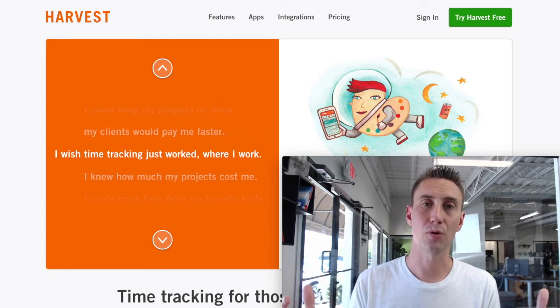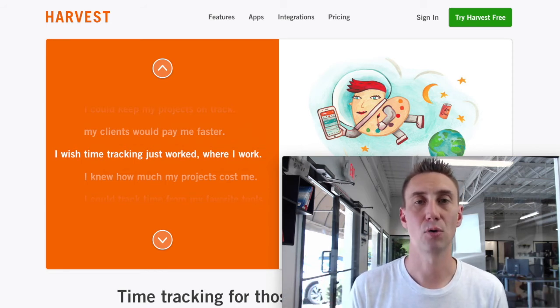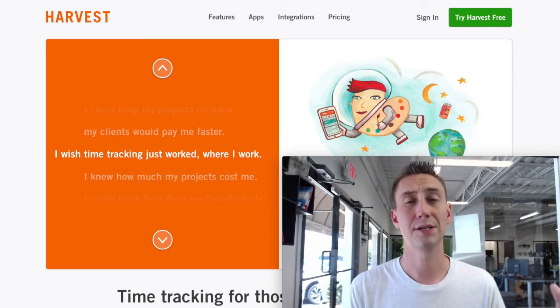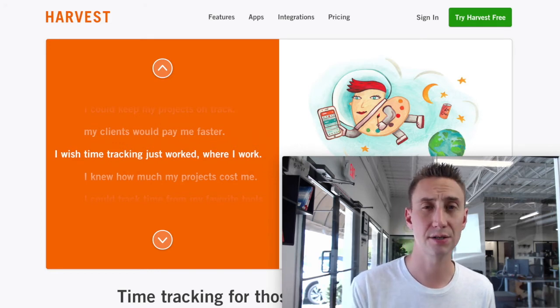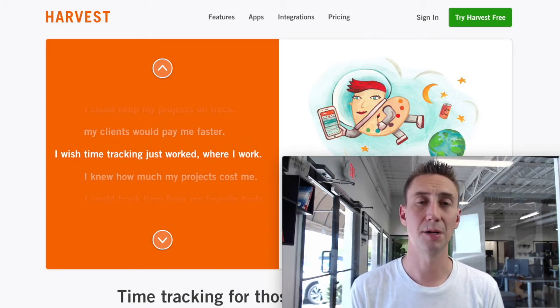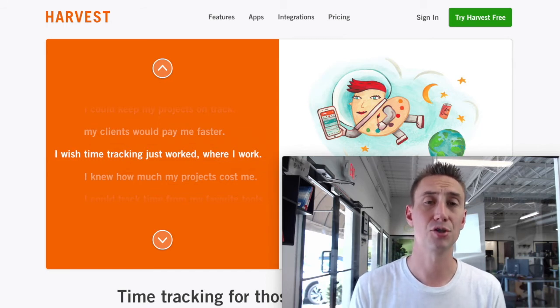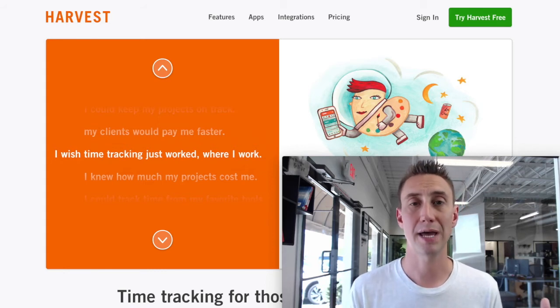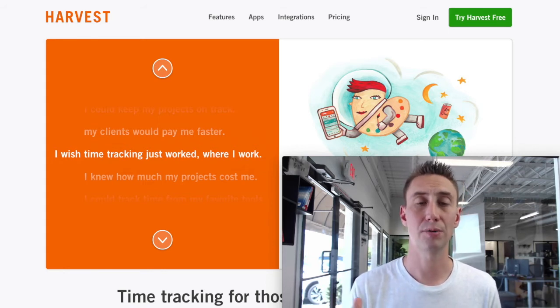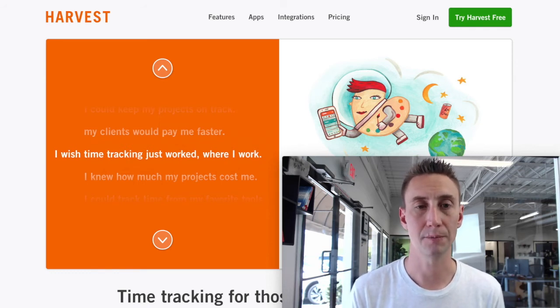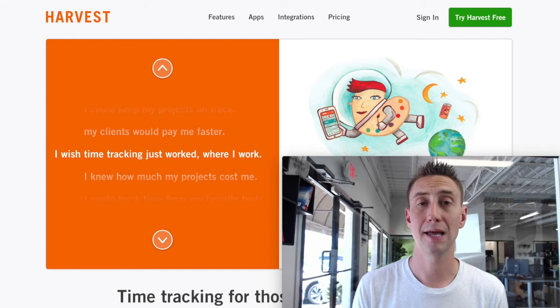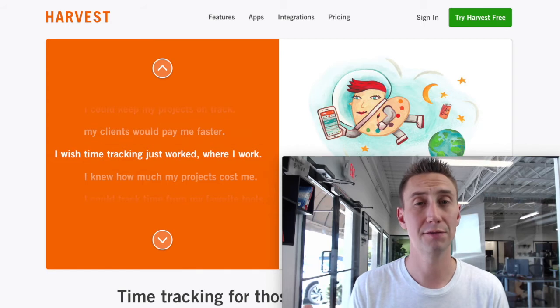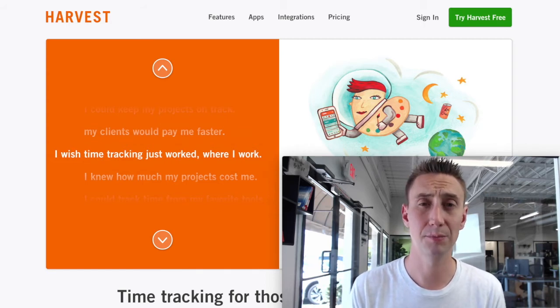It's not like we just stop working on a client when we get there, but for me, it's important to know, hey, if we're spending double the amount of hours that we have allocated to this client's paid media account, we either need to talk to the client or change some things internally or optimize our report process. There are a number of different adjustments we can make, but I want to make sure that I'm tracking time correctly. And Harvest has provided tons of insight in Paracore's past about how projects are working, if they're profitable, and how we should handle those moving forward. I will say that it's a little bit hard to get everyone on board initially, but once everyone's dedicated and focused and it just becomes part of your culture, it's incredibly powerful.